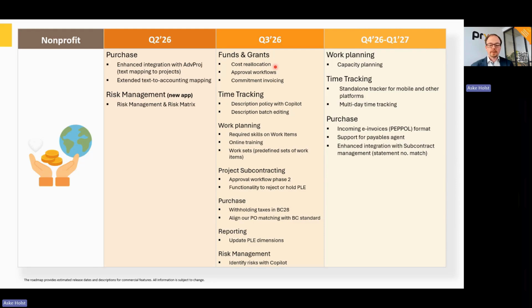Is it based on the total cost split of the projects we are reallocating to? Is it based on the time spent by different employees? What is the key? Is it an equal split? Different kinds of splitting, and it will either take cost out of an internal cost project or an overhead project and move it to the actual projects, or it will take that cost out of the general ledger, find those cost accounts, take the amount for a period, and reallocate that out to different projects as overhead.